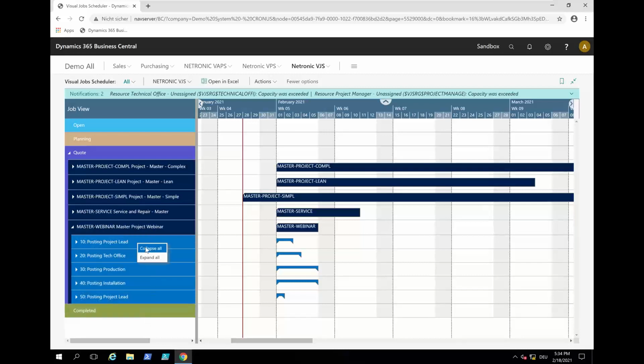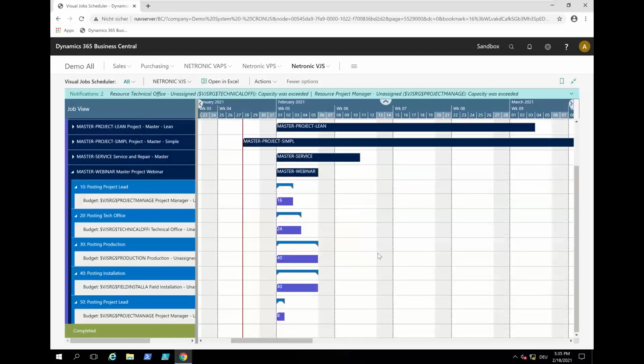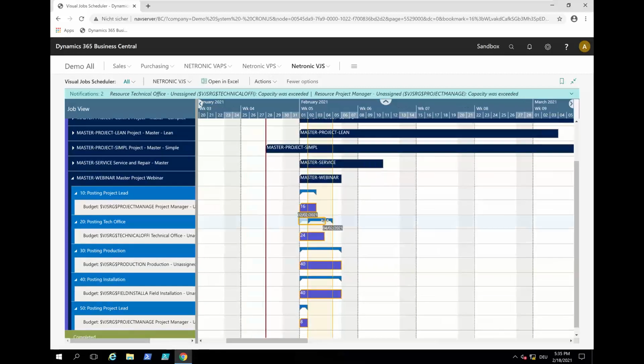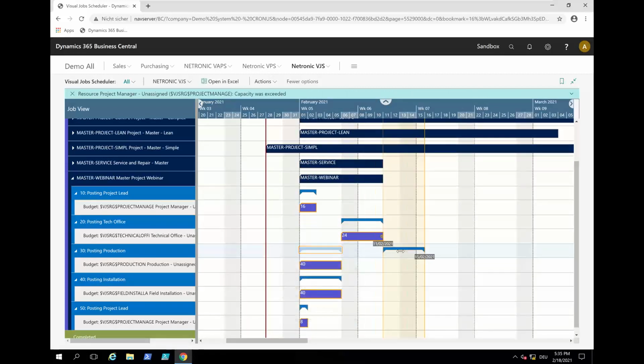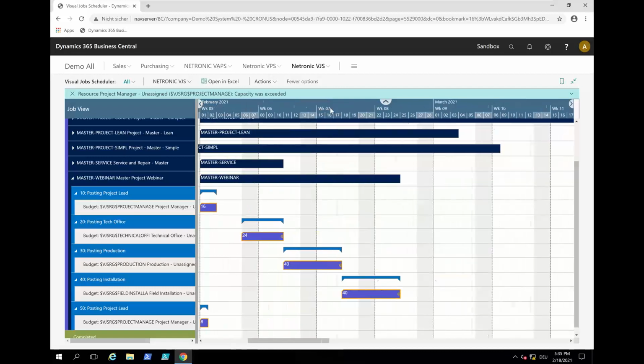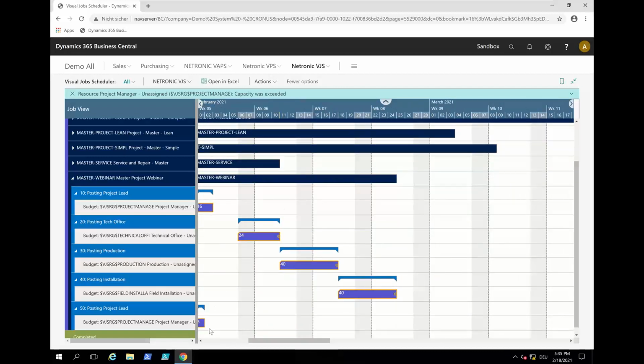So I say, okay, I just want to time schedule it from here, and let me expand it all so that I can see. Then I say, okay, the first task, 16 is okay, but what I have here should happen when this is done. Then this should happen when this is done. This should happen when this is done. So I'm just moving this stuff. And then I say, okay, the last one happens when that is done. Now I have the structure of my project.